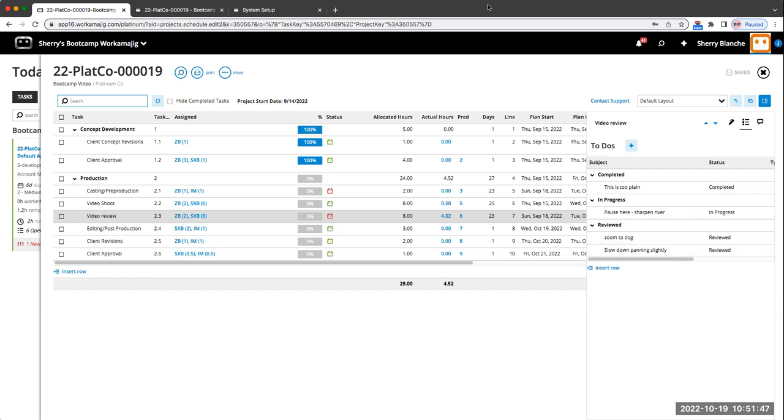Okay, so I have another question of, can I show or explain how it impacts resourcing creatives? So do deliverables to do show up in the staff schedule? Well, that's an excellent question. No, they will not. So now they can put time to it, but you cannot just put time to a deliverable. So you still have, even if your schedule is only one task, this is still your resourcing.